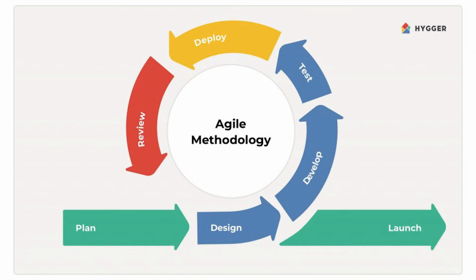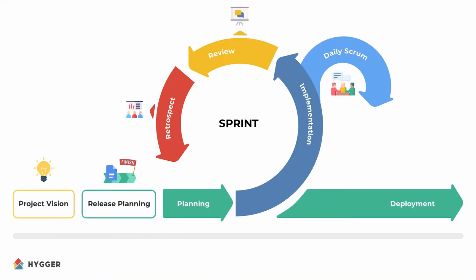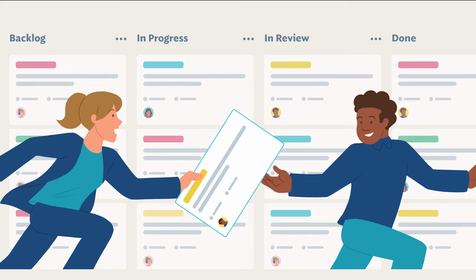There's a whole video I could probably do on the specifics of doing production on a game. Won't be going in depth about it in this video, but if this is something you're interested in, then let me know in the comments and we can expand on this later. For right now, I'm just going to cover sprints. This is a way you can organize a lump sum of work and put deadlines on yourself or your team to help meet your release goals. Sprints are typically 2 weeks, and the goal is to complete those tasks within those 2 weeks. Not finishing all the tasks is okay.